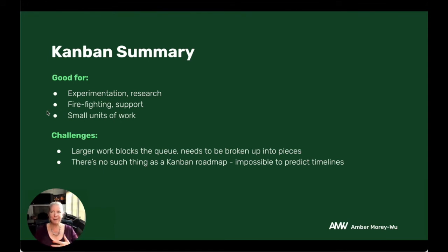To bring that back to software development, you really want to have tasks that are only like a half day to 2 days maximum. Any longer than that, then it blocks up that pipeline and things don't flow through. That reprioritization process is not taken advantage of. So you really need to think about if it's bigger than that to try and break it down into smaller pieces.